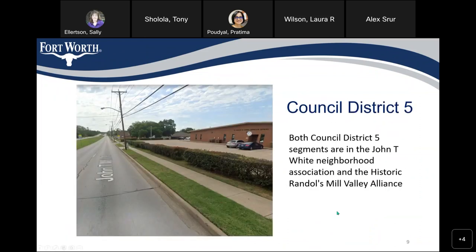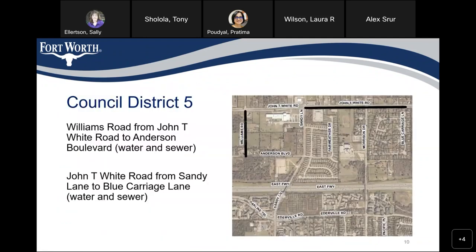In Council District 5, the segments are in the John T. White Neighborhood Association and Historic Randall-Mill Valley Alliance. The first replacement is on Williams Road, where we are going to replace the water line and extend the sewer line to John T. White Road. The other section is on John T. White Road itself, where we are going to replace water and sewer from Sandy Lane to Blue Carriers Lane.